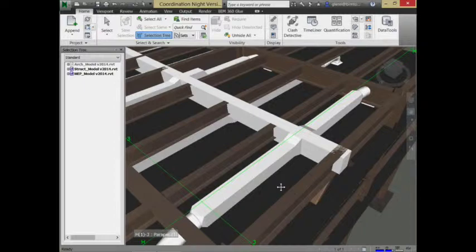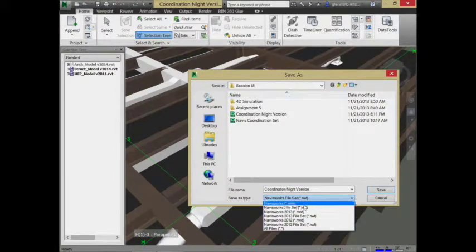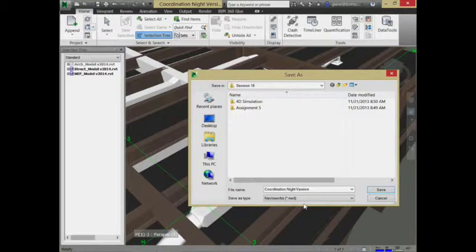Okay. So the other way you can save this is as something called the Navisworks document. The Navisworks document actually copies everything in, so I get a completely self-contained file. I can give you one file and it'll have everything you need in it as of 6:05 p.m. on 11/21. It's locked in time to right now. It's nice to have a snapshot of what's going on. It won't update itself automatically. So easy, it gives you a snapshot. A little more complicated, the live linking gives you something more useful.